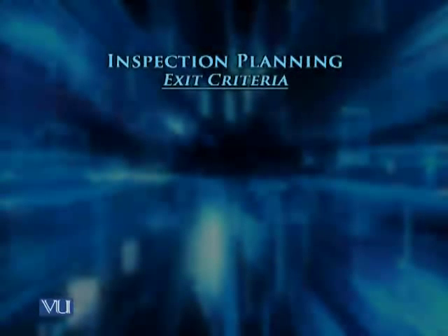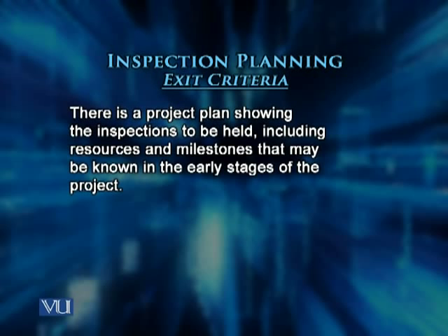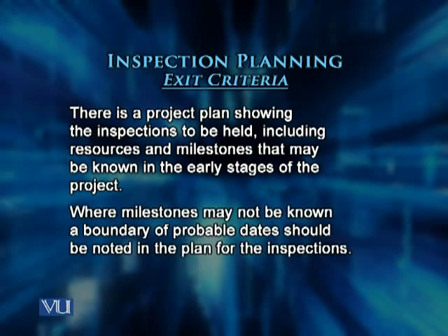What are the exit criteria for inspection planning? Think about it for a second: if you are planning for inspections and you have finished planning, what would you need? You need a project plan showing the inspections to be held, including resources and milestones that may be known early in the project lifecycle. And wherever those milestones are not known, a boundary of probable dates should be noted in the plan for the inspections. That is, in some cases, we would know exactly that the inspection will be held on such and such a date. Let's pick a date. I would say 27th of March.